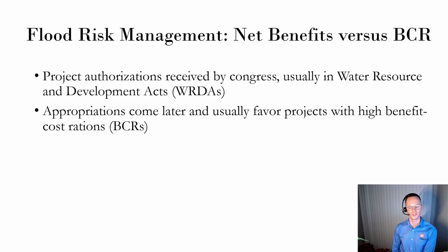The moral of the story is that when choosing one from among many exclusive options, or choosing how much to invest in any one project, you continue until additional benefits equal the additional costs. In other words, you have maximized net benefits. When given multiple options and a budget, the highest net benefit plan is the portfolio of plans with the highest BCRs.